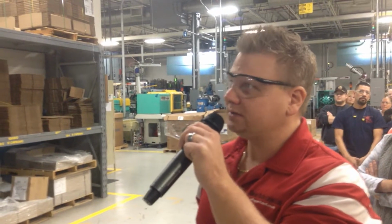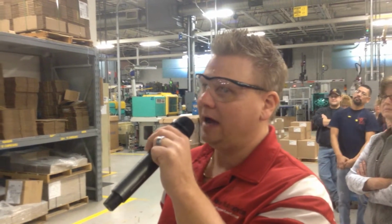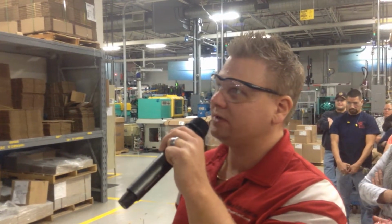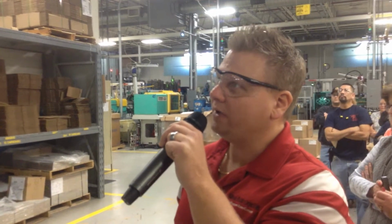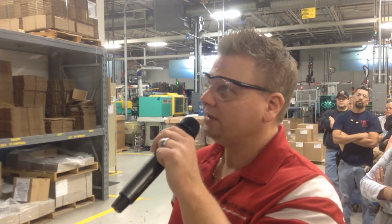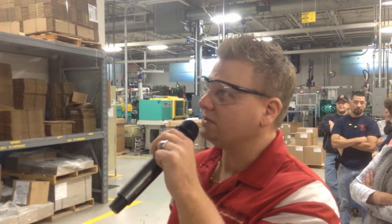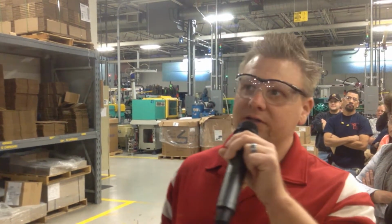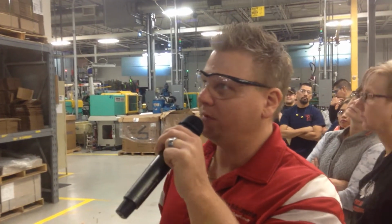We have two 10-ton cranes that are being manufactured right now. They're nearing completion. We were over at Cedar Crane last Tuesday overviewing the progress of this. Right now we have a tower system that is being manufactured out on the East Coast. That's due in mid-February. A new compressor from Atlas Copco, that's due in mid-February. Our floor over at the new building will be poured approximately next Monday. That will be the start of that.